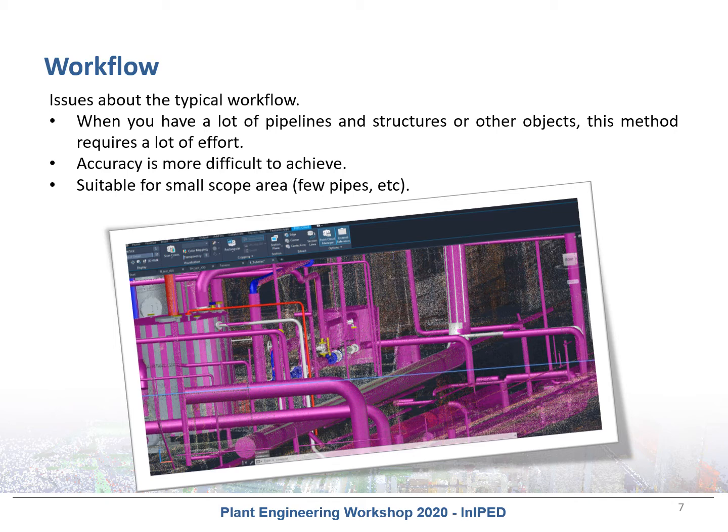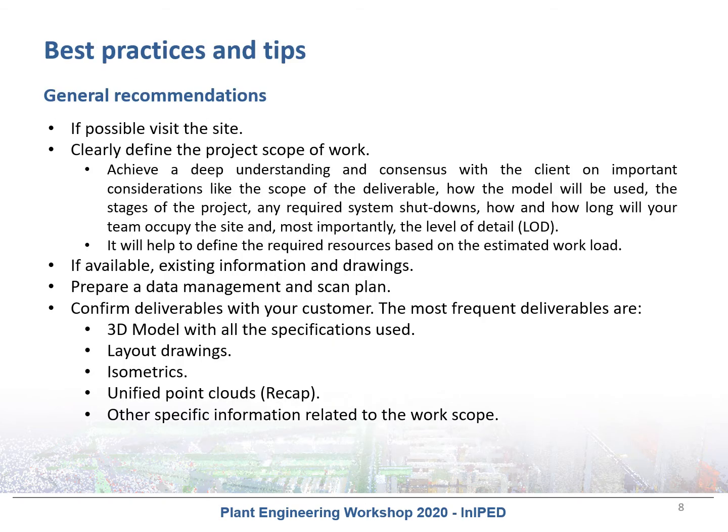As you can imagine, if you have a high density of pipelines in your scope area, it will take a lot of time and effort to create the 3D as-built model. In this project, it is important and helpful to visit in situ the area subject to the scope of work. During this visit, it is important to have in mind the planning of the scope of the work to be done.